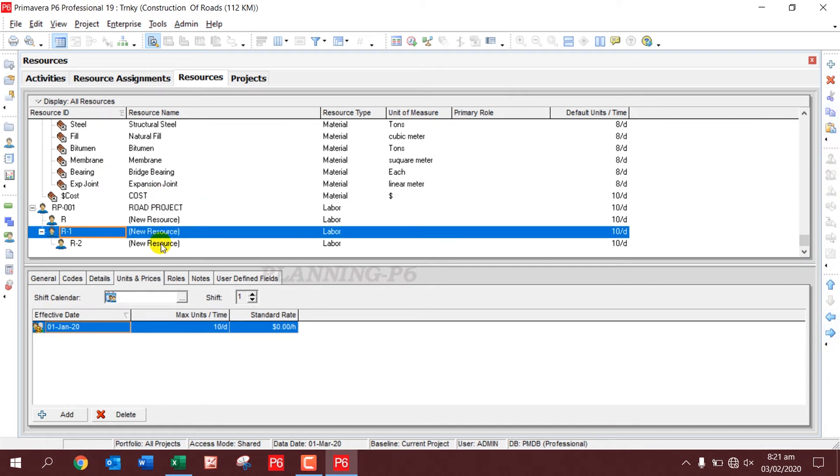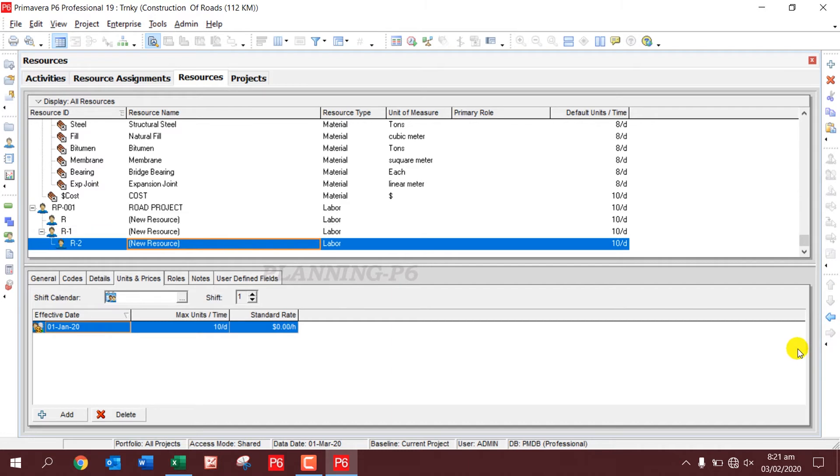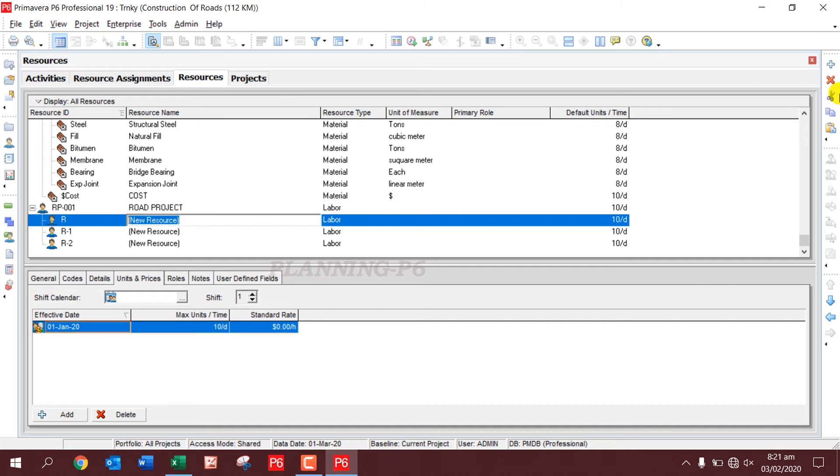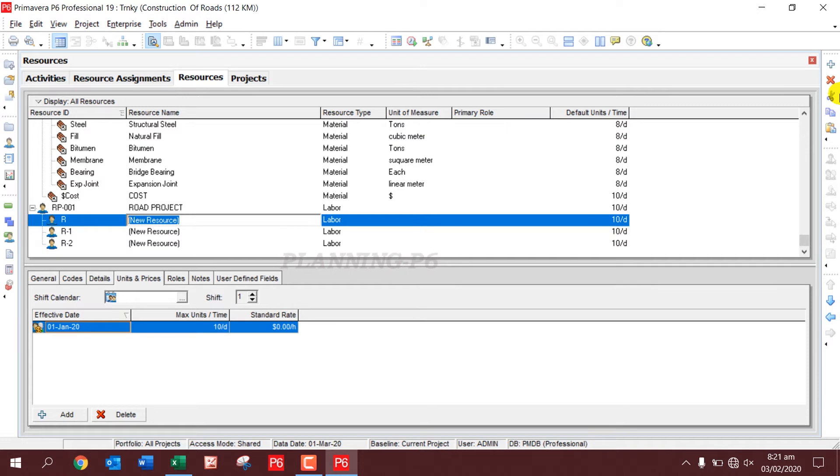These are R1, R2. Please note there are three types of resources: Labor, Material, and Non-Labor. Here we will mention Labor.